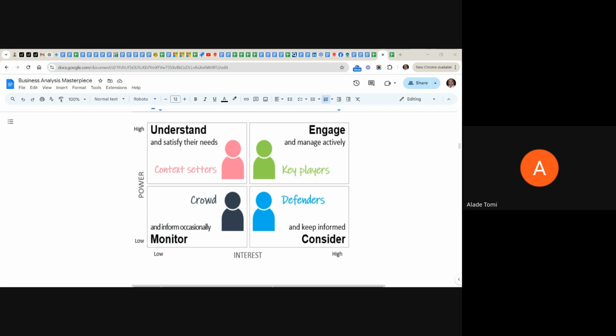Let's assume the money for this project is 2 million naira. That 2 million naira will be dispensed by the finance team, but it's going to be removed from the budget for the sales department. So that is why the HOD for sales is the one financing that project, because it's removed from his own budget. It's not removed from the budget for the finance department.